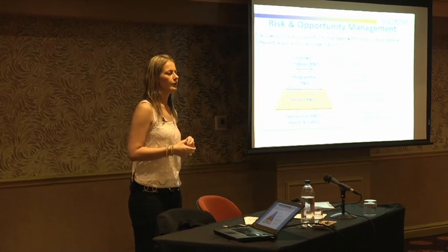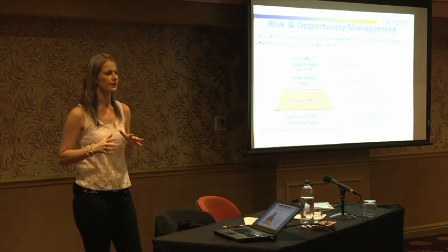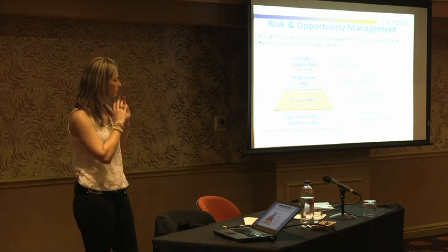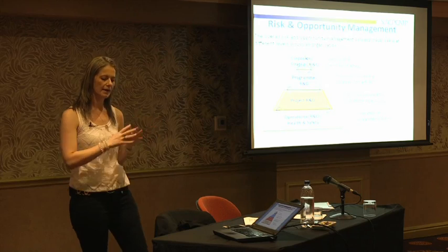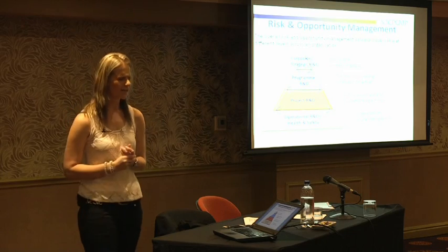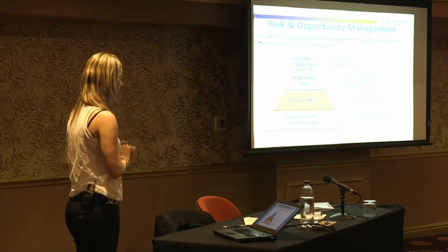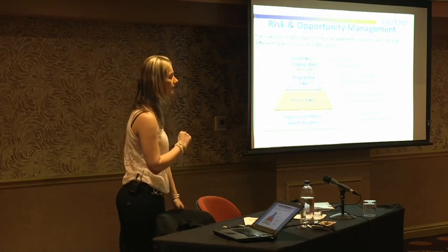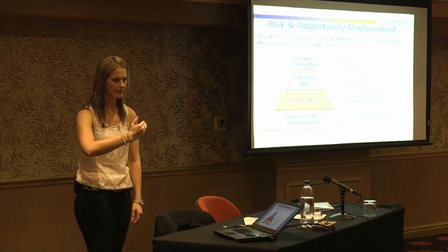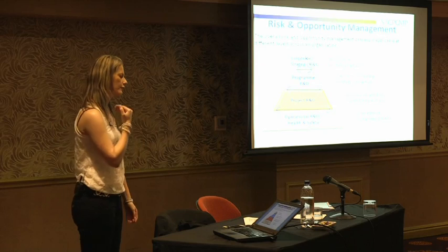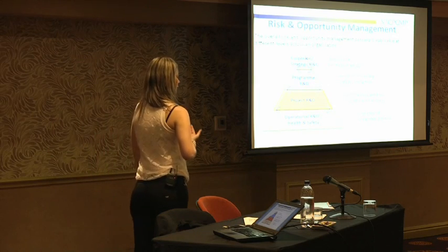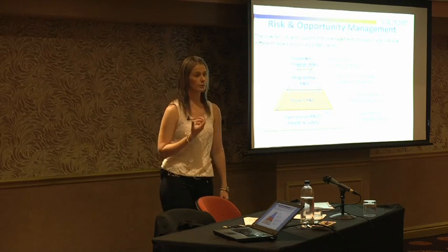Those are the type of risks we will roll up to corporate and strategic. So for example, if something drastically on the project is posing a threat to what the company had in mind strategically, and let's say it will be a huge impact, like the project might be delayed for 2 years. It means 2 years worth of investment, we're paying interest on that, and for 2 years we won't be able to capitalize it when we thought we were going to.